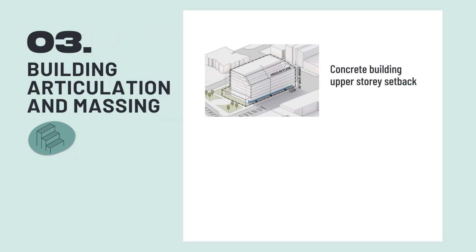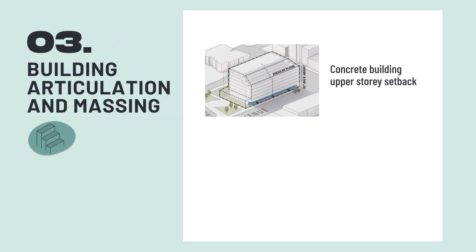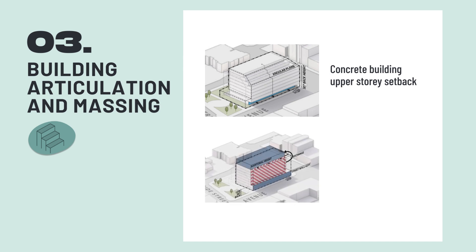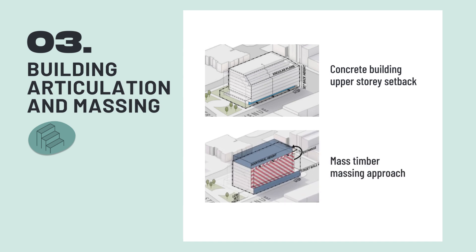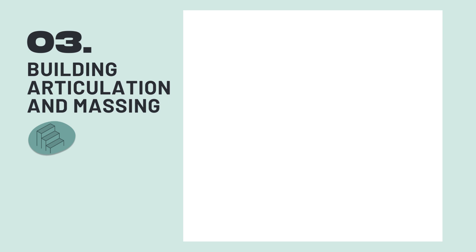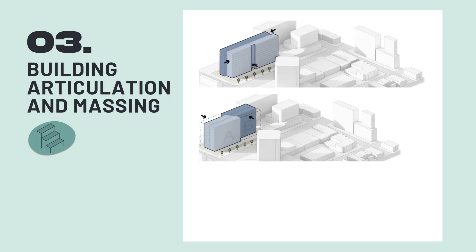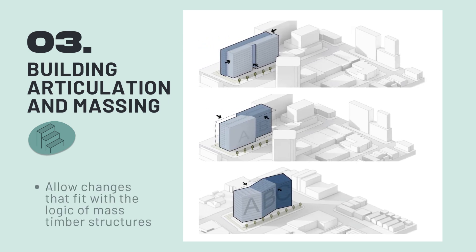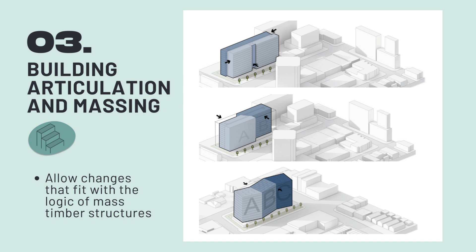Official community plans often request upper story setbacks and facade breaks so the building looks less bulky and imposing. This can be difficult and expensive to achieve with mass timber builds, as they rely on repetitive stacking of structural elements. Guidelines should allow designers to use simpler changes that fit with the logic of timber structures, such as large scale, singular or rational moves, rather than requiring complex and costly adjustments.